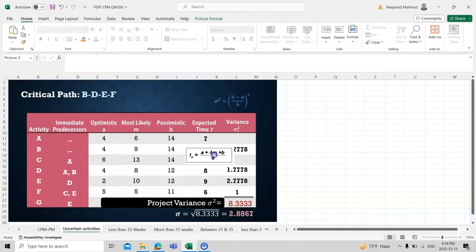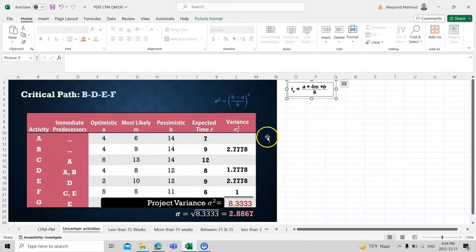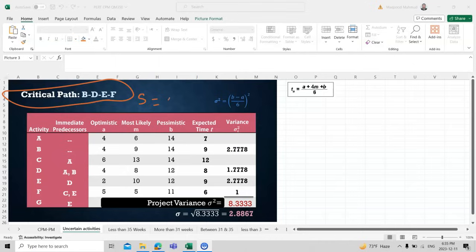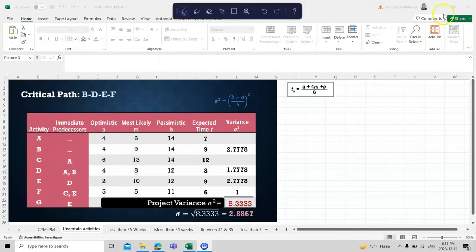Once we have calculated all expected times, we need to find the variance. We do not find the variance for all tasks — only for tasks on the critical path. In the previous session we found the critical path was B-D-E-F, where the slack value s = 0.